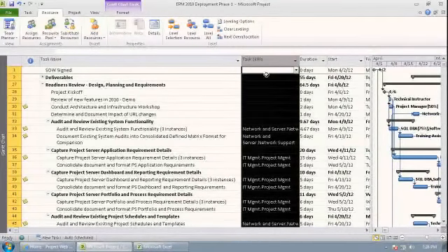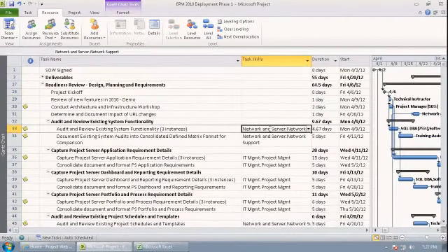And you can do this in Microsoft Project too, even if you don't have Project Server to work with. You can create what are called local custom fields that just exist in your project. But if you have Project Server, then you can ask your friendly Project Server administrator to create an enterprise custom field, maybe called task skill. That field can then be used across all of your projects in your organization. So regardless of the project, you can insert a column like I just did here, called task skill, and then go down through that column and specify what kind of skills are necessary to complete each one of these tasks.